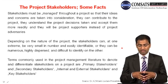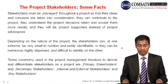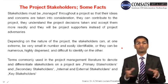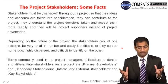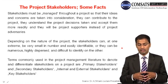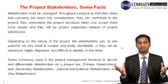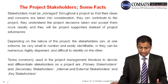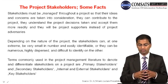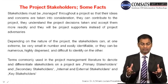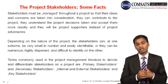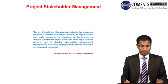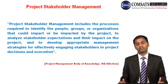Depending on the nature of the project, stakeholders can at one extreme be very small in number and easily identifiable — if you are constructing a 5-Marla house, the number of stakeholders is very small. On the other hand, they can be numerous, highly dispersed, and difficult to identify — if you are constructing a 300-kilometer motorway through virgin lands. Terms commonly used in project management literature to differentiate stakeholders are primary stakeholders, secondary stakeholders, key stakeholders, internal stakeholders, external stakeholders, and so on.